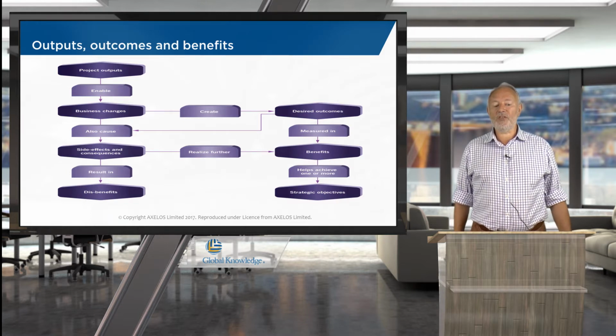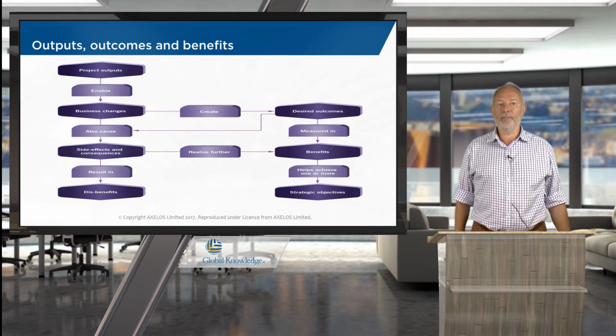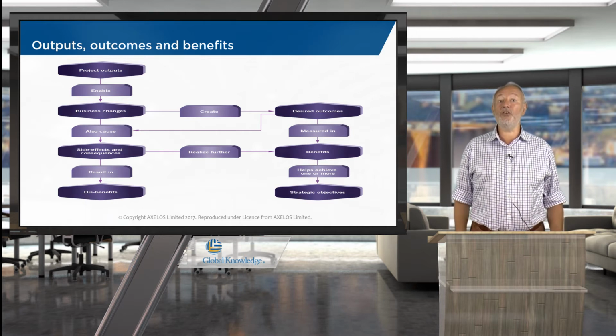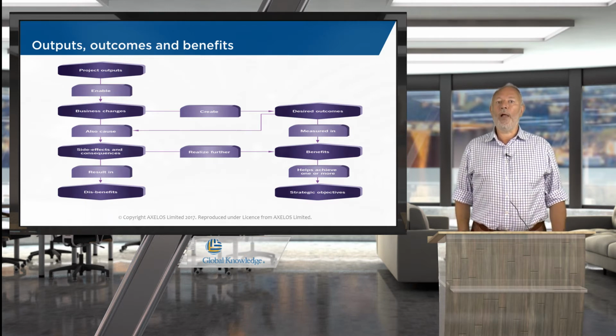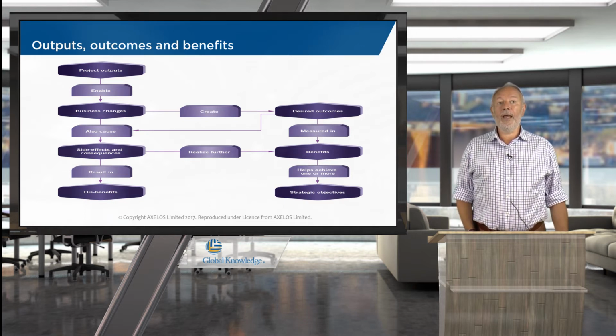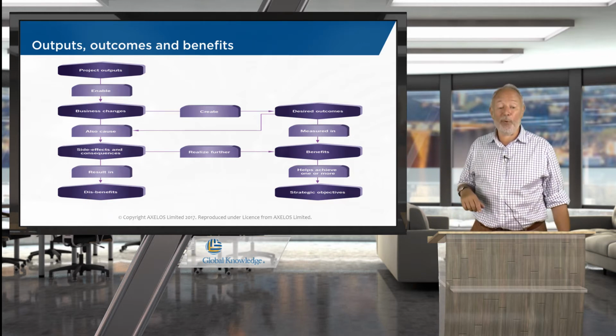What is the business case predominantly looking at? Well, it's helping us to understand what's going to happen after the project. Clearly the project and the project plan is going to cover what's happening during the project, and that will help us to understand the costs and the timescales and the risks, or most of the risks. However, the business case is going to add to that by looking at what will happen once the project's product has been delivered.